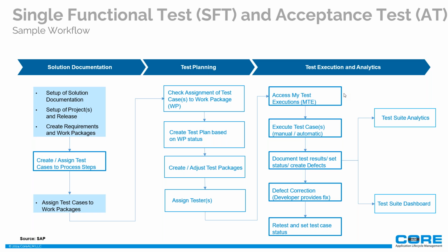The developer provides a fix, we retest the defect, and then we can also see it on the dashboard all the time. We can monitor the status of the testing, and there are also analysis reports that we can export and share with the PMO and other project leadership that are interested in the status of the testing. So this is basically the workflow from creation till execution of the testing, right? It's very simplified, but this is what it takes to start and finish the testing.